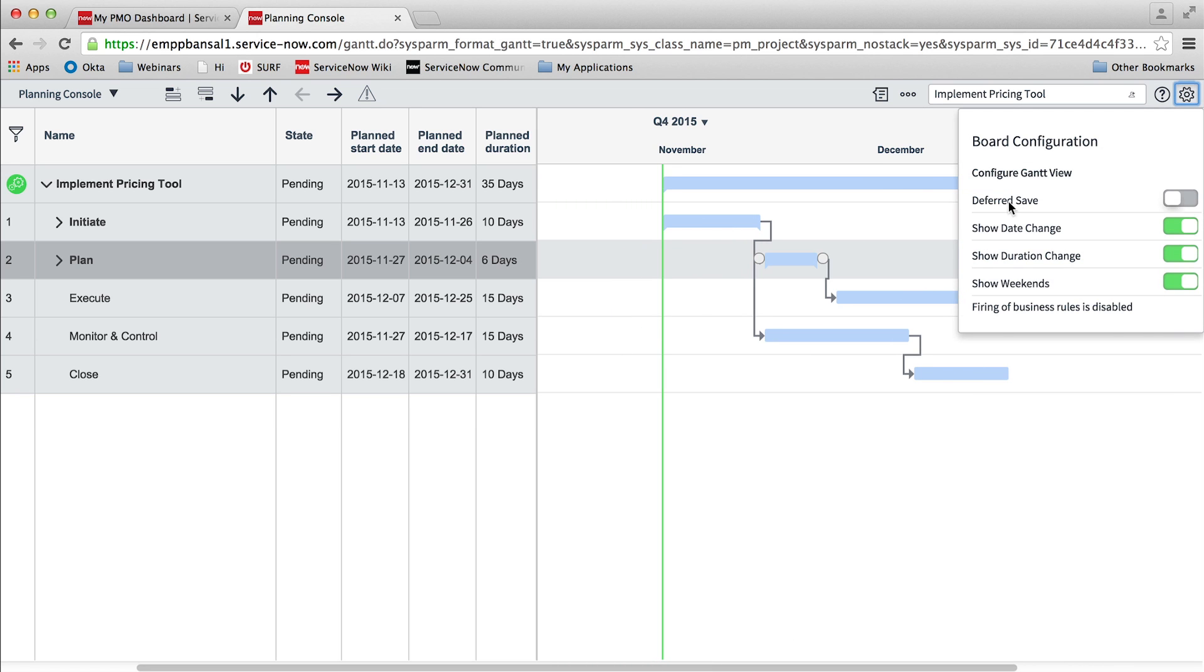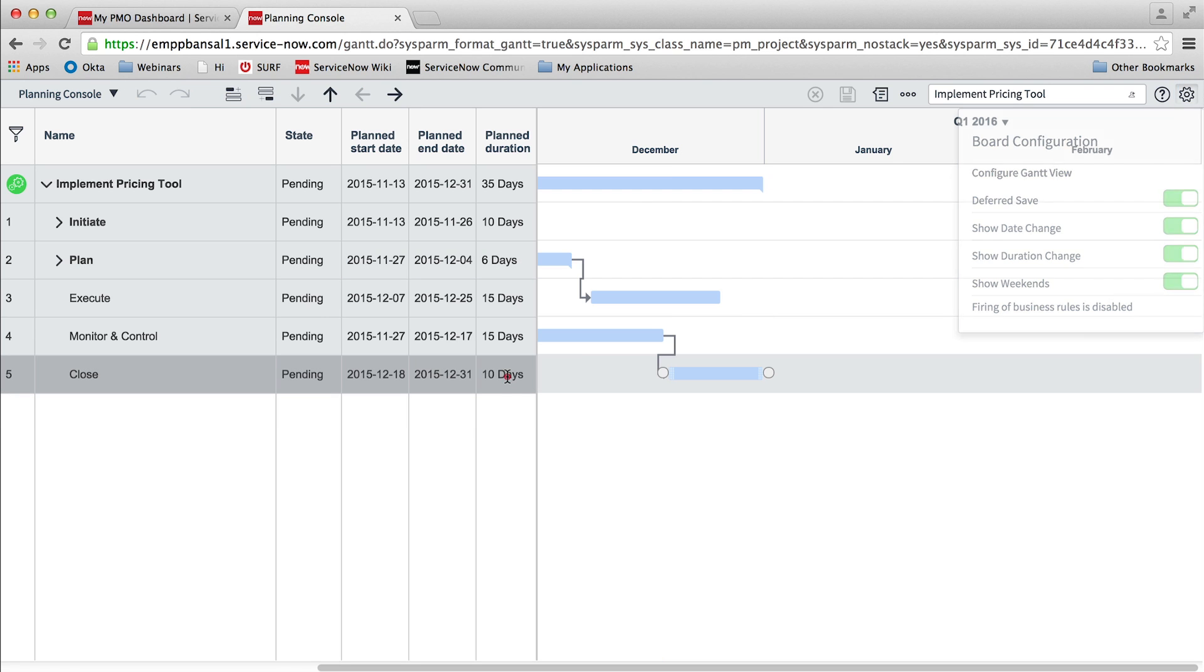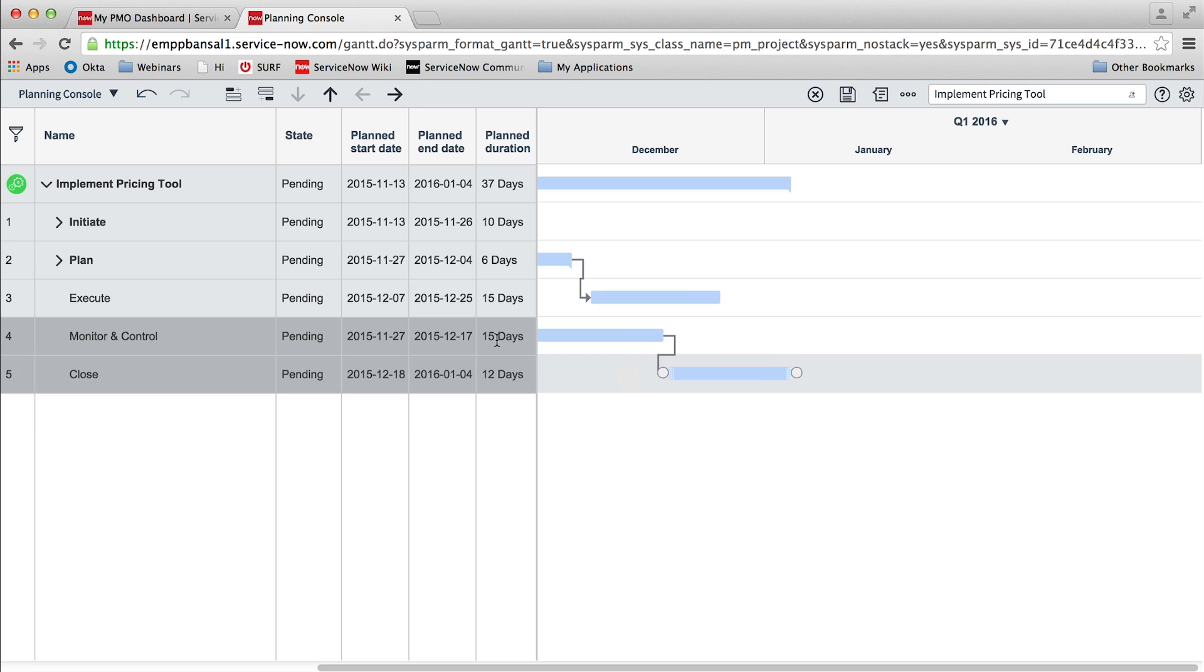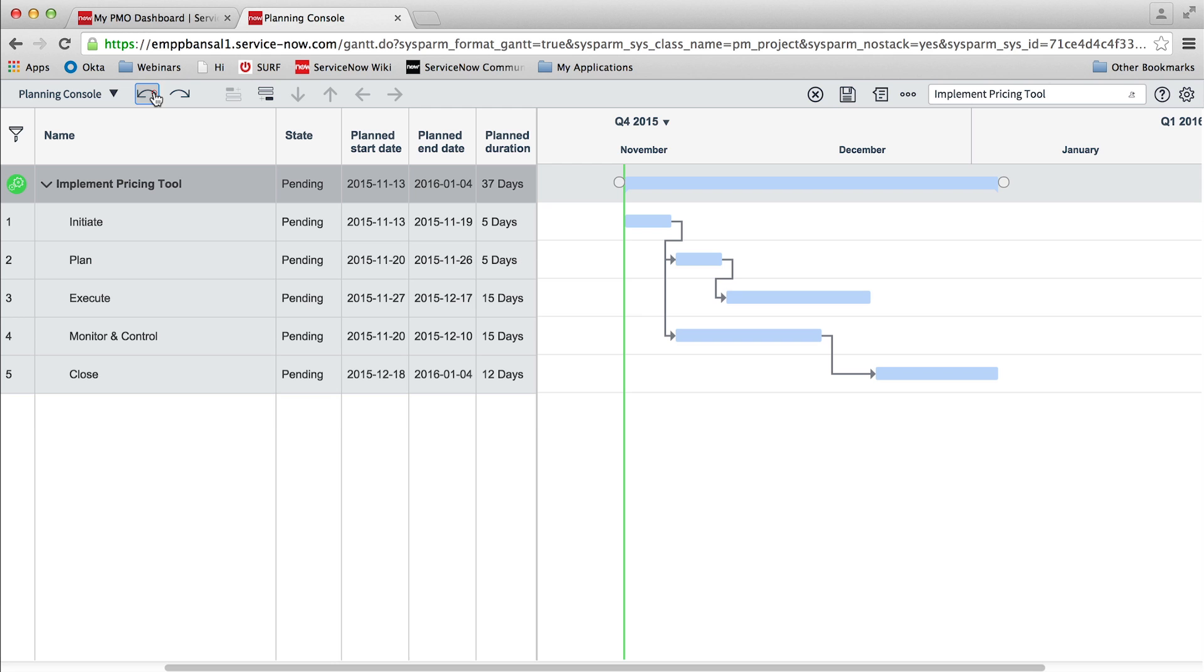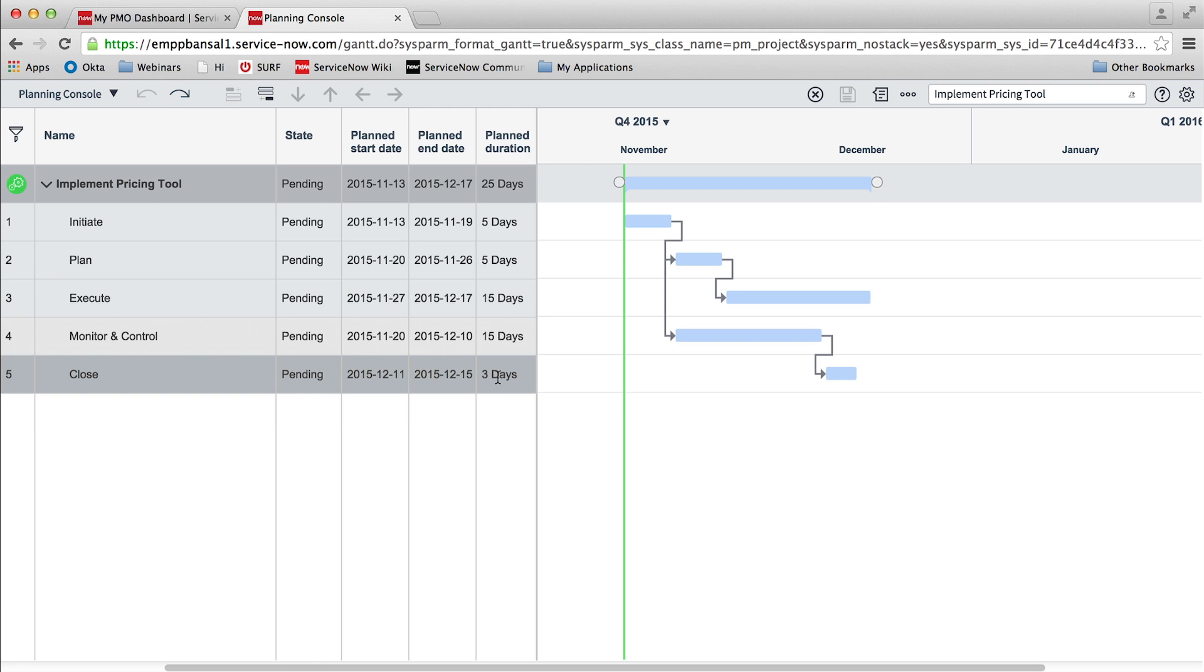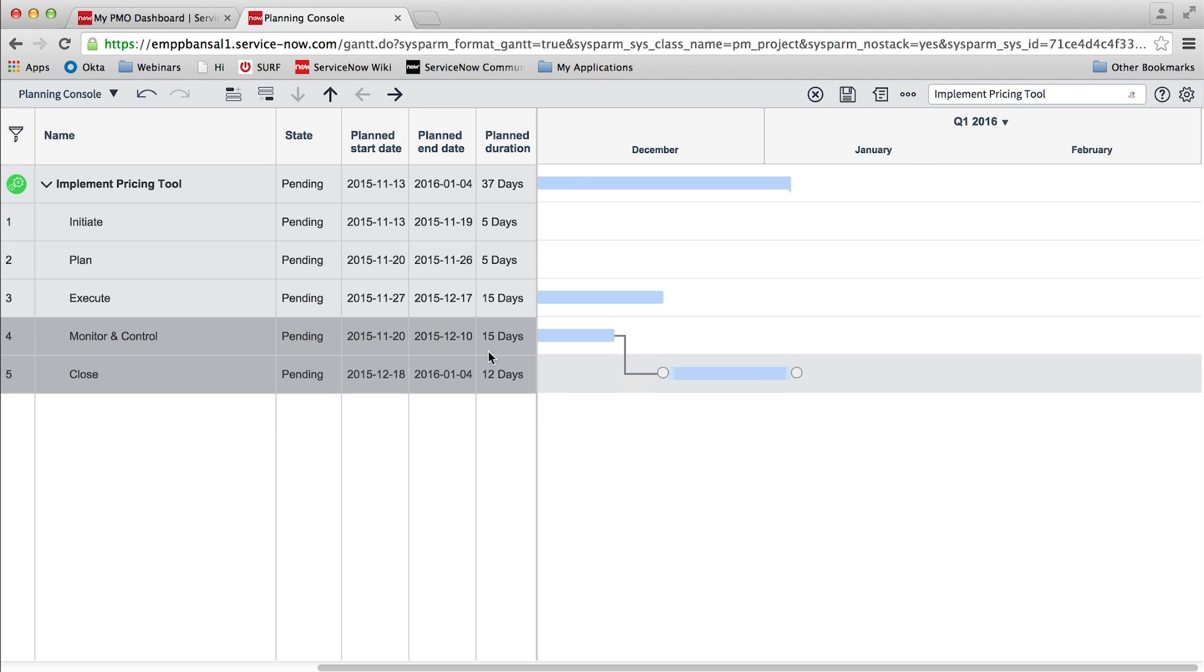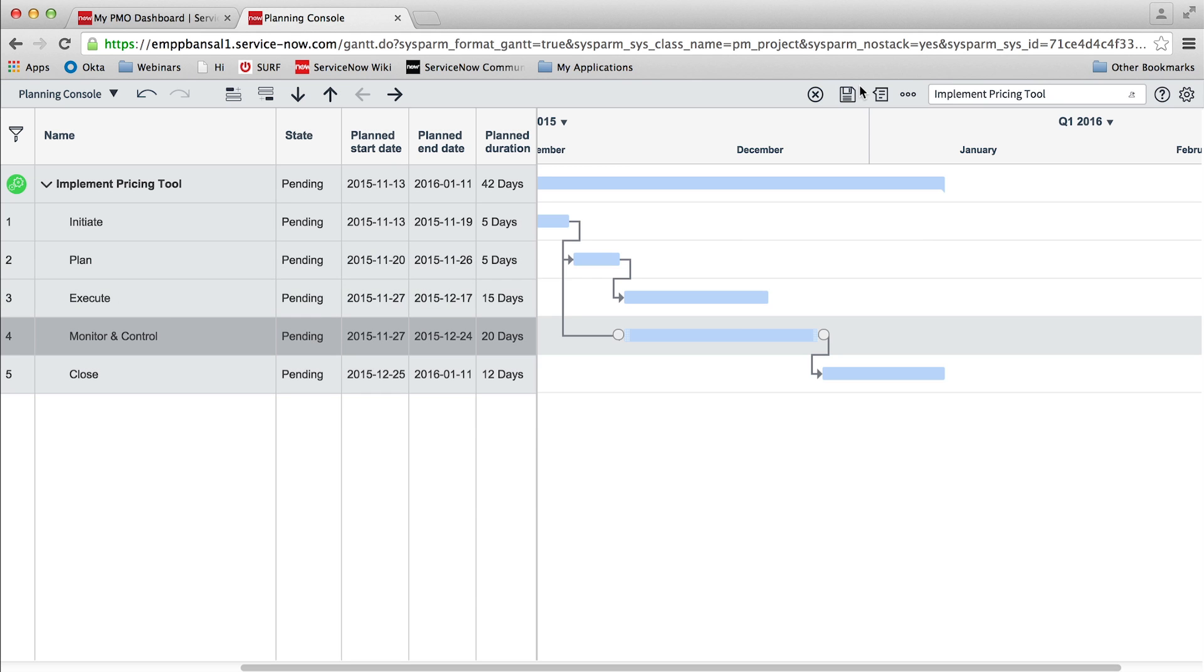Project managers can also enable deferred save mode to perform what-if analysis. In this mode, any changes made to a project and its tasks, such as a change in task dates, are not saved immediately. Project managers can review the impact of these changes on the schedule, and if they want to revert the changes, they can either undo the changes one by one, or they can choose to cancel the changes completely.